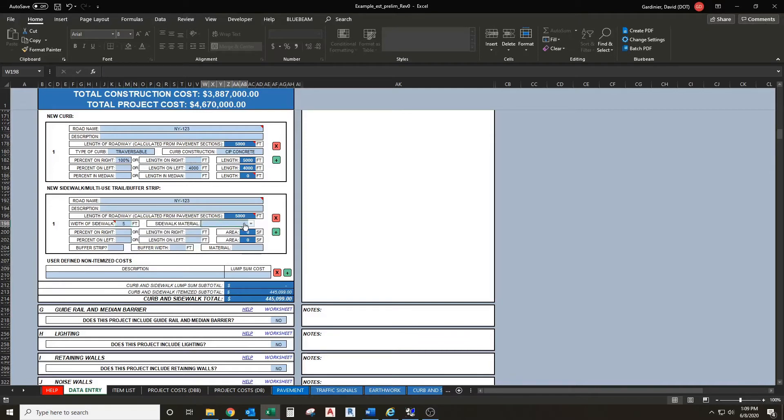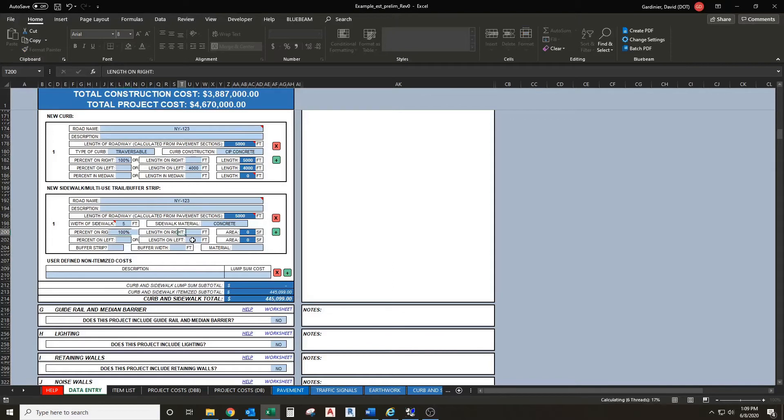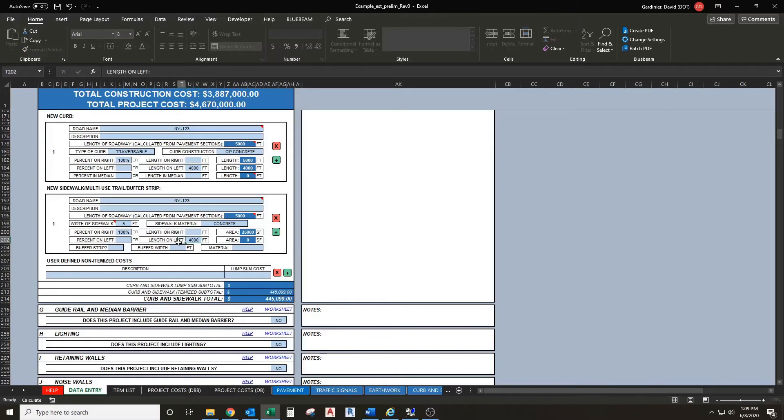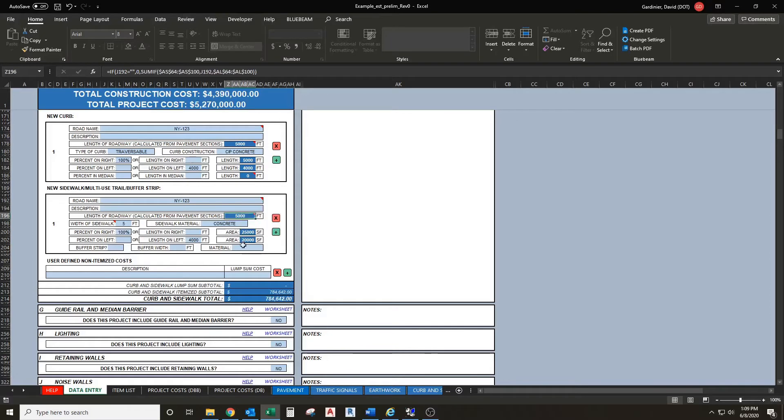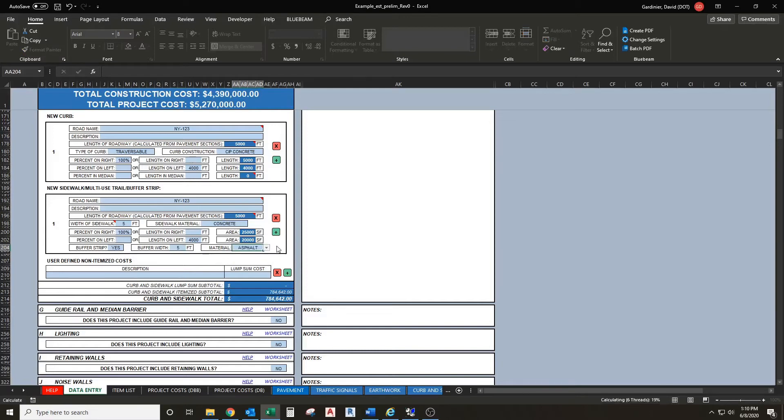Next we're going to select sidewalk material. Let's pick concrete here. Let's say we have sidewalk everywhere we have curb, so we'll enter in 100 percent on the right and 4,000 feet on the left. You'll notice it's coming up with an area of sidewalk over here based on the width and the length depending on which you enter. We can also add a buffer strip for the whole segment. Let's say we have a 5 foot buffer and we can call it asphalt. Now we have an itemized subtotal for curb and sidewalk.